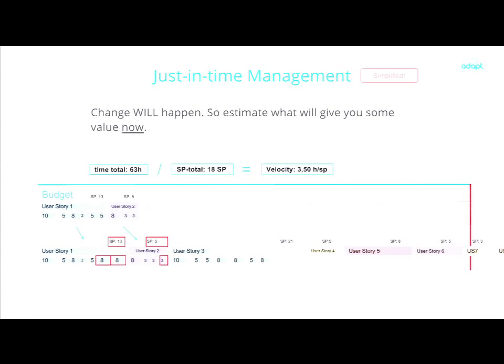But we can take this discussion with the client and customer up front and find out a solution for this, because we are working on a time and material basis. So they just pay per hour. So we need to guide the customer here and help them and show them how much we'll do. And we can always tell them, this is how it looks right now. Then we start working on some more user stories. We can be lucky that some of them are less complex than we thought, and then we do this again. But we always need to keep tracking this.